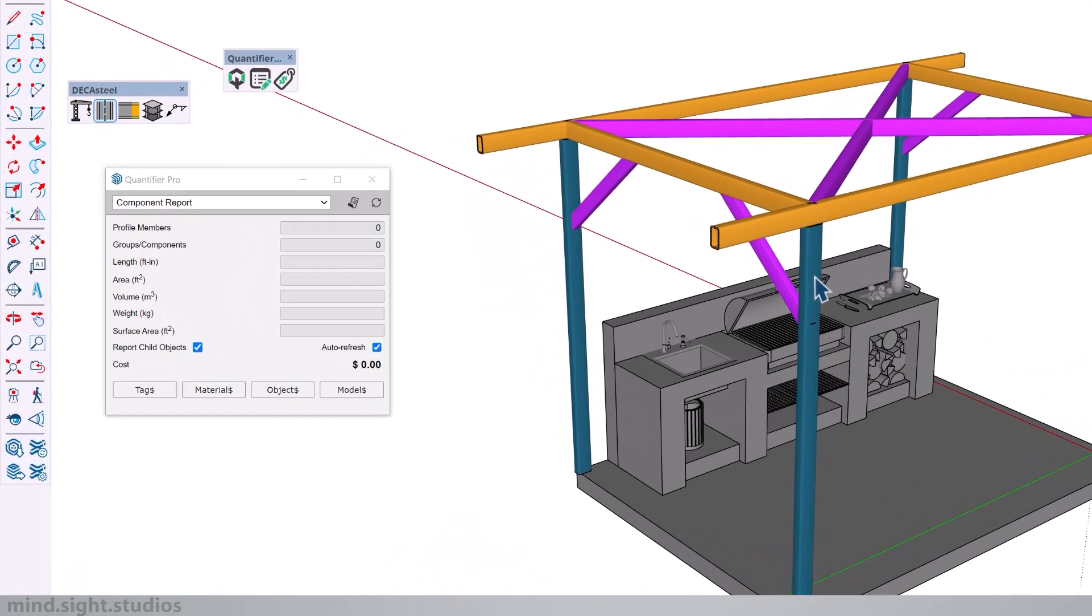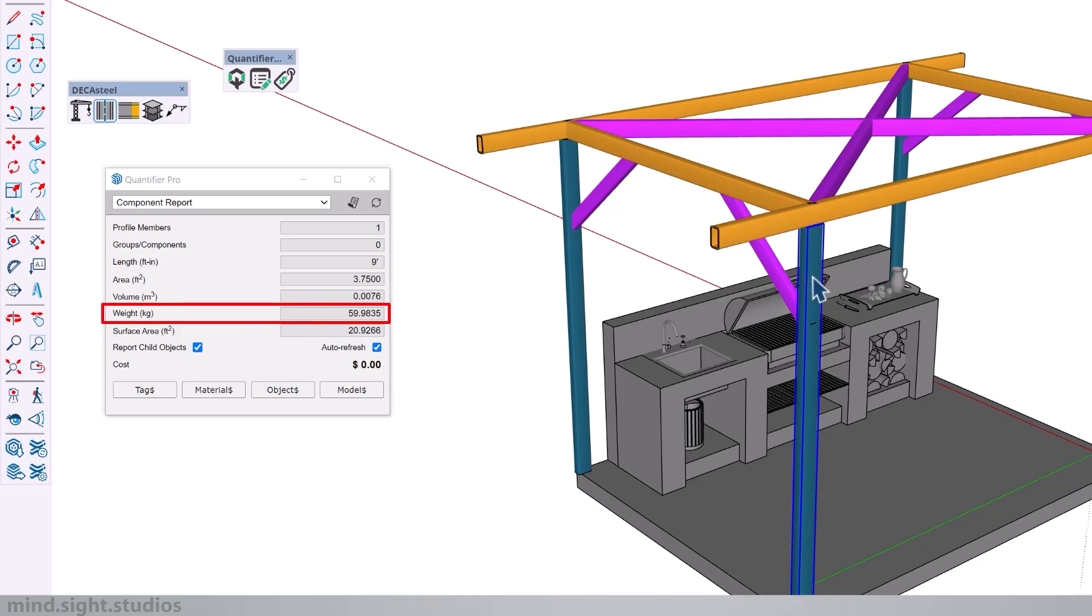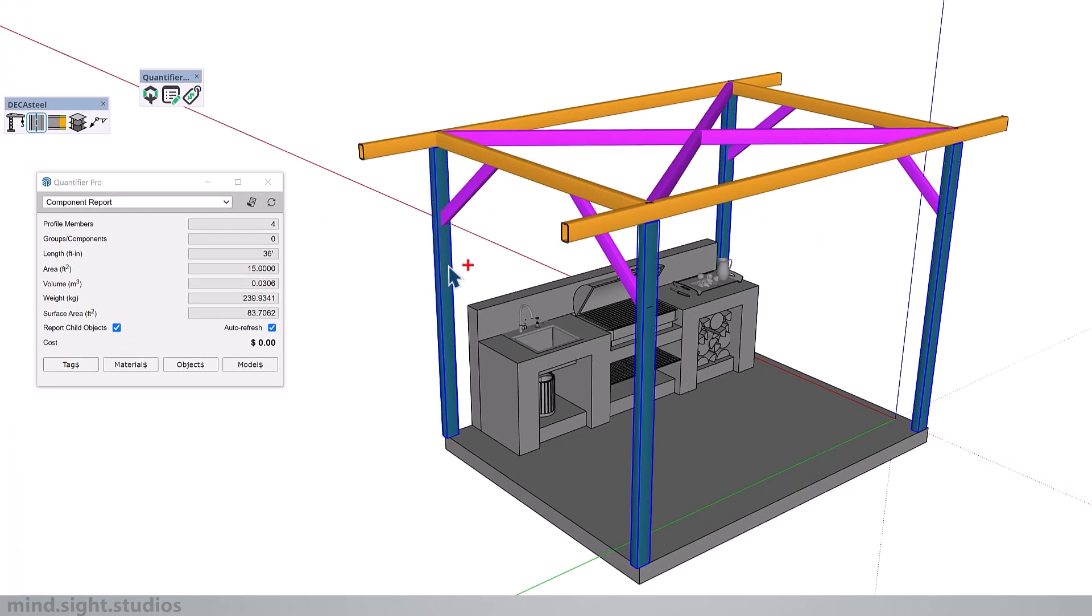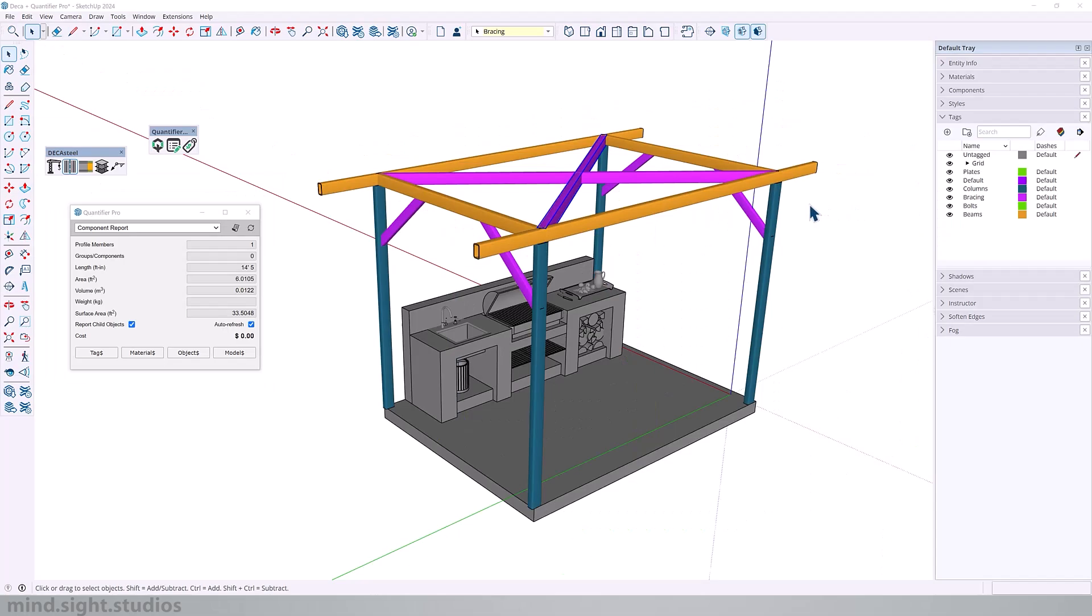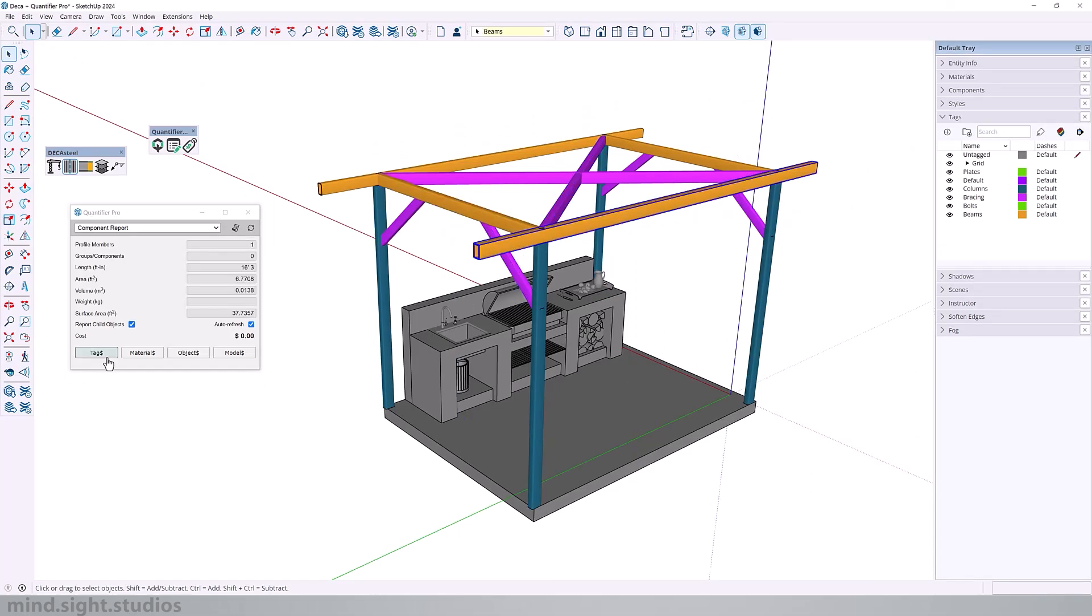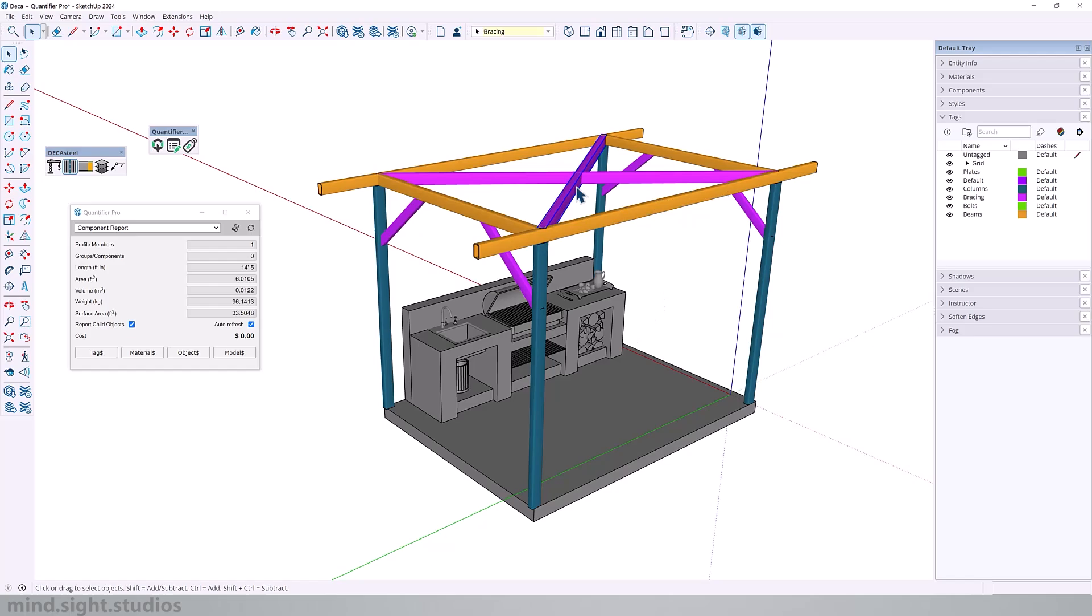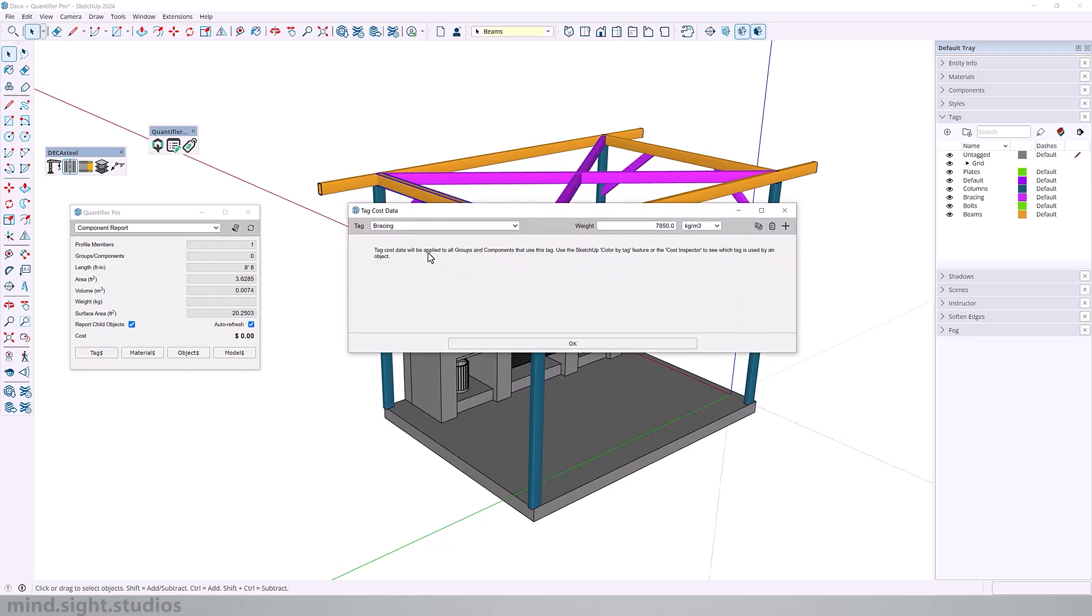So now when we reselect our posts, you can see that the weight is being calculated. And because we set this on the column tag, we can select all of our posts, and it will calculate the values for all four posts. Now, as I mentioned earlier, the beams as well as the bracing are categorized as steel. So technically they will have the same density value. So I'm going to add the same value for the bracing and the beam tags.